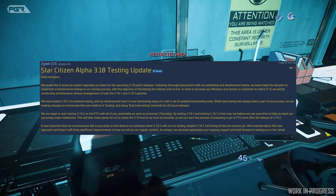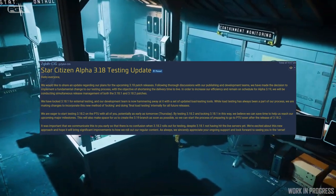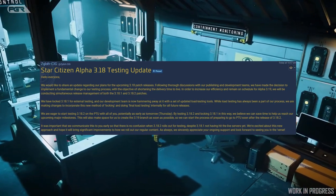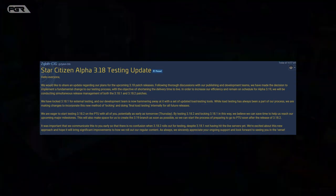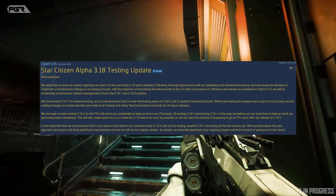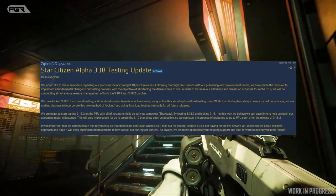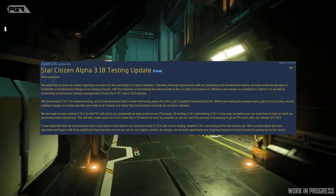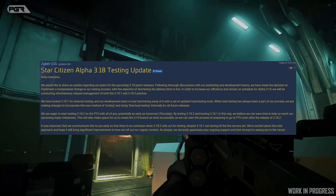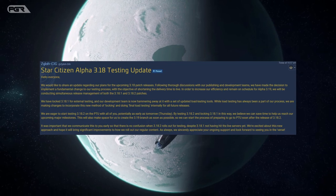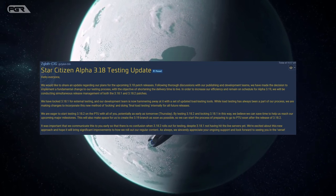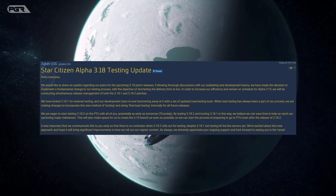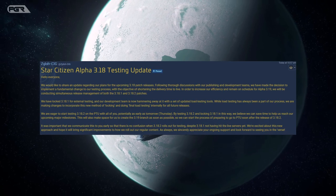It also says we have logged 3.18.1 for external testing and our development team is now hammering away at it with a set of updated load testing tools. While load testing has always been a part of our process, we are making changes to incorporate this new method of locking and doing final load testing internally for all future releases.